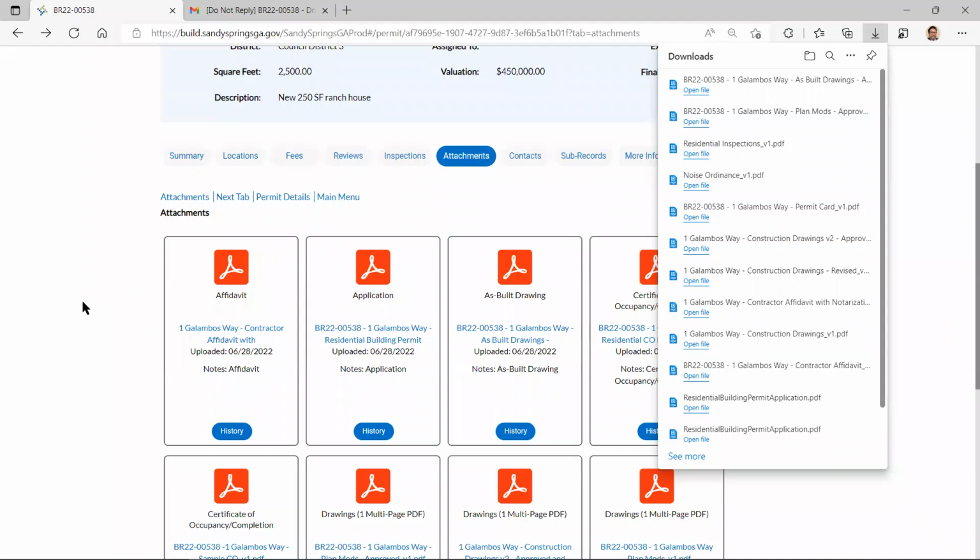So things like that. In those instances, because I know appliances specifically, especially for some of the homes that we're building around here, they may be on back order. Yeah, I know, like the Wolf ranges and stuff like that, you need to go ahead and order it before you apply for your permit. Because if you think you're going to get away with it, you're not. You're going to be changing.